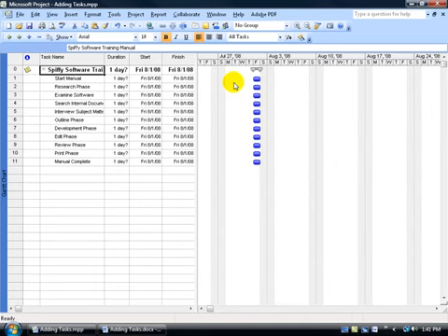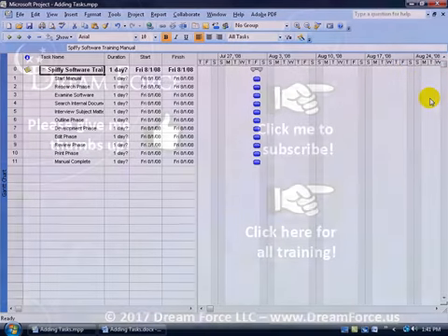In fact, visually it looks better over here in the Gantt chart. In other words, up at the top you've got your project summary. It's got the first little starter marker here, and it'll always stay here on the start date. Now as these tasks expand and go out to 5 days, 6 weeks or so on, this end marker is going to stretch to capture that. So you can see as a summary as a whole that in order to complete the whole project, all these tasks below have to be completed, including the one that goes all the way out for 2 or 3 months.